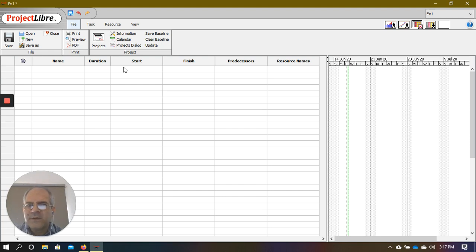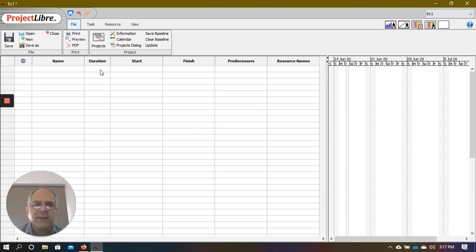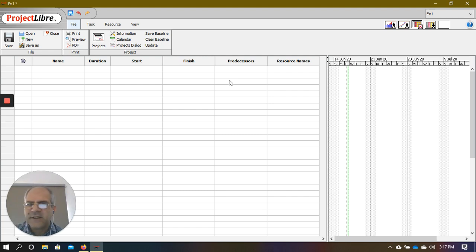Now I'll extend the window. This interface is familiar — if you've used Microsoft Excel, it has a similar grid view with rows and columns. Each column has a name: activity names go in one column, duration in another. If you don't enter the duration, you can enter start and finish dates and it will automatically calculate the duration for you.